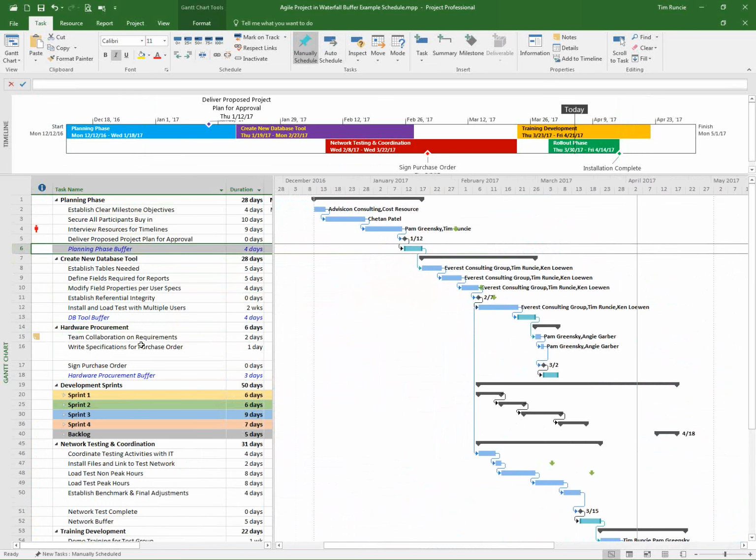Well, one of the approaches that we find very successful, if you want to capture a range of time, is this: everyone knows that if you've been given 4 days or 10 days to deliver something, work will expand to fit the schedule. So what we'll do is say, listen, I need you to give me the lean estimate. We think in terms of critical chain, looking at what it will take to deliver the activities that you're working on. If we have lean estimates, we'll certainly baseline those, right?